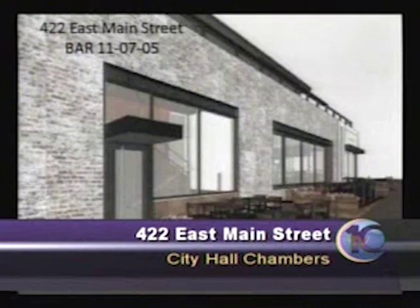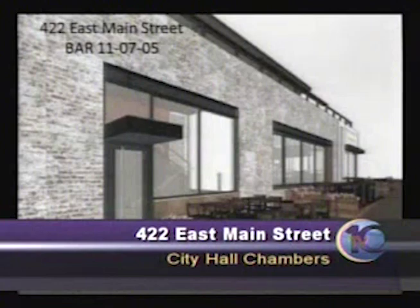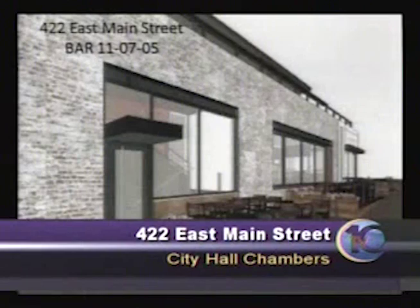Because of the timing of this project, we unfortunately did go ahead and order these big sliders for the front and the side to be 9 feet, 108 inches each, and so when the floor tipped down a little bit towards the side, that opening dropped a couple of inches. On the front, I could show you this, the mall goes up a couple of inches on this side, and because this is a slider, for water reasons it can't sit below the mall. So that one went up a couple of inches, and the other one went down a couple of inches, and we're sorry that we were not able to control that situation.